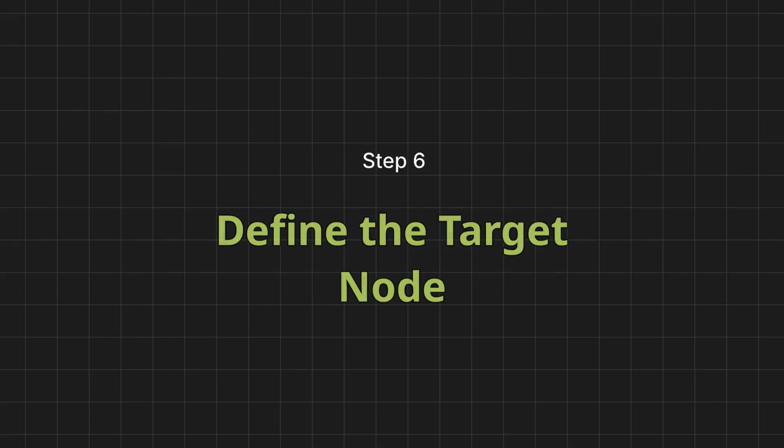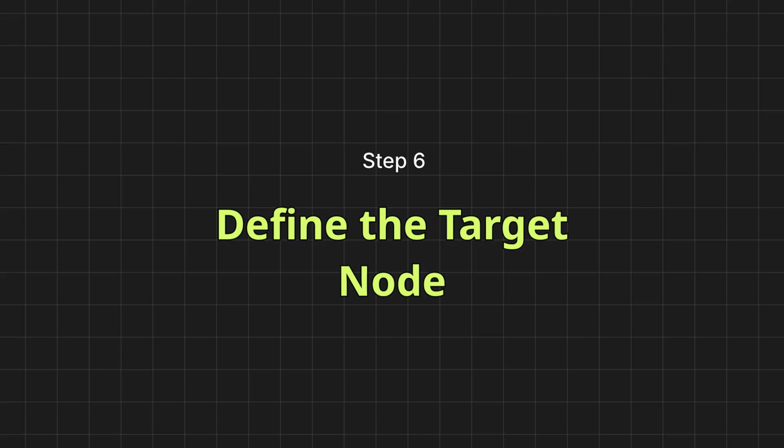Step 6 involves defining the target node. The target node in the BN represents a measurable project performance issue, e.g., budget overrun or schedule delay. This variable should be specific enough to inform PM decision-making but generalized enough to avoid data fragmentation. The number of its possible states must balance interpretability with statistical reliability, typically optimized using metrics such as the Akaike Information Criterion, AIC, or Bayesian Information Criterion, BIC.